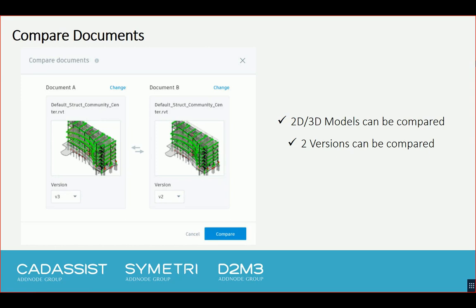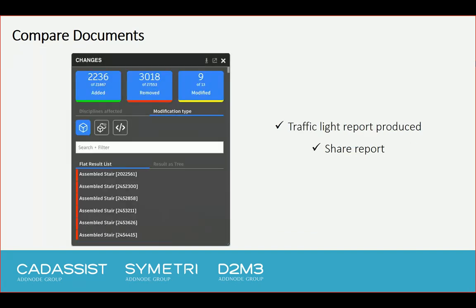You might have forgotten about a change or not even realized that a particular addition of a door has changed something to the wall, or whether it's going to change anything elsewhere. So it's really good for a visual purpose, and the computer will tell you basically what has changed, what hasn't changed. Yep, you can see here if a project has not been published for a while, a lot of work has been done to it, then you can see this number can actually range into the thousands. What we've seen there was just a simple modification of a couple of doors within the project.